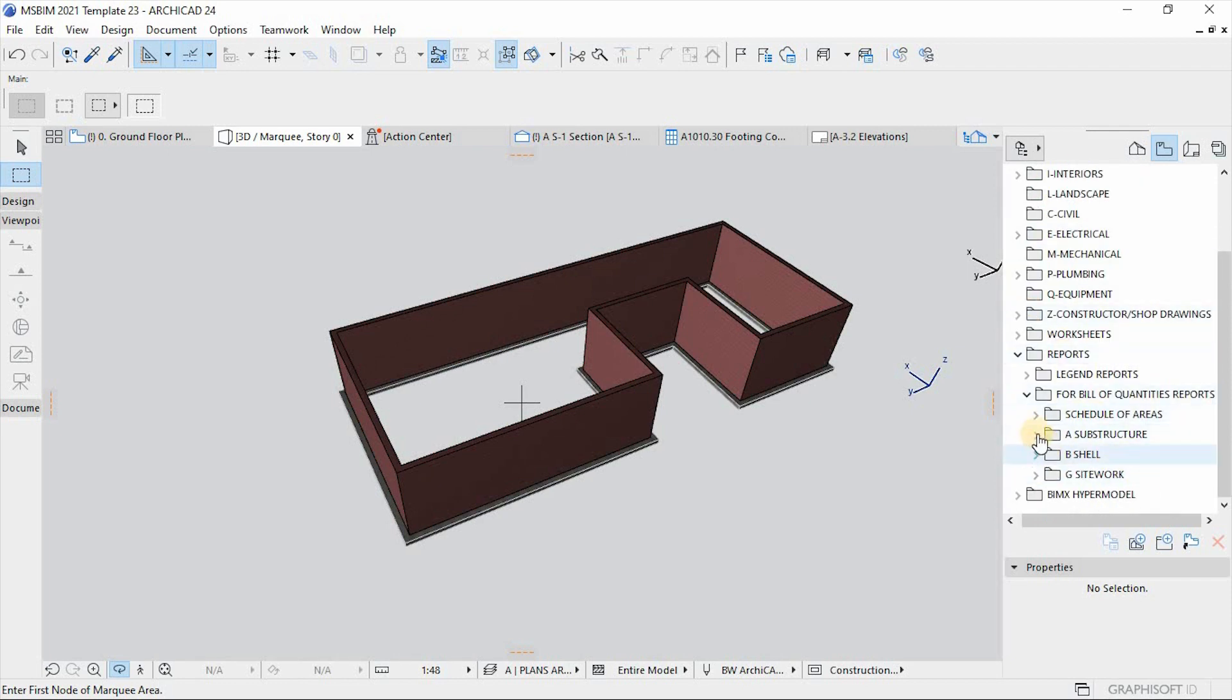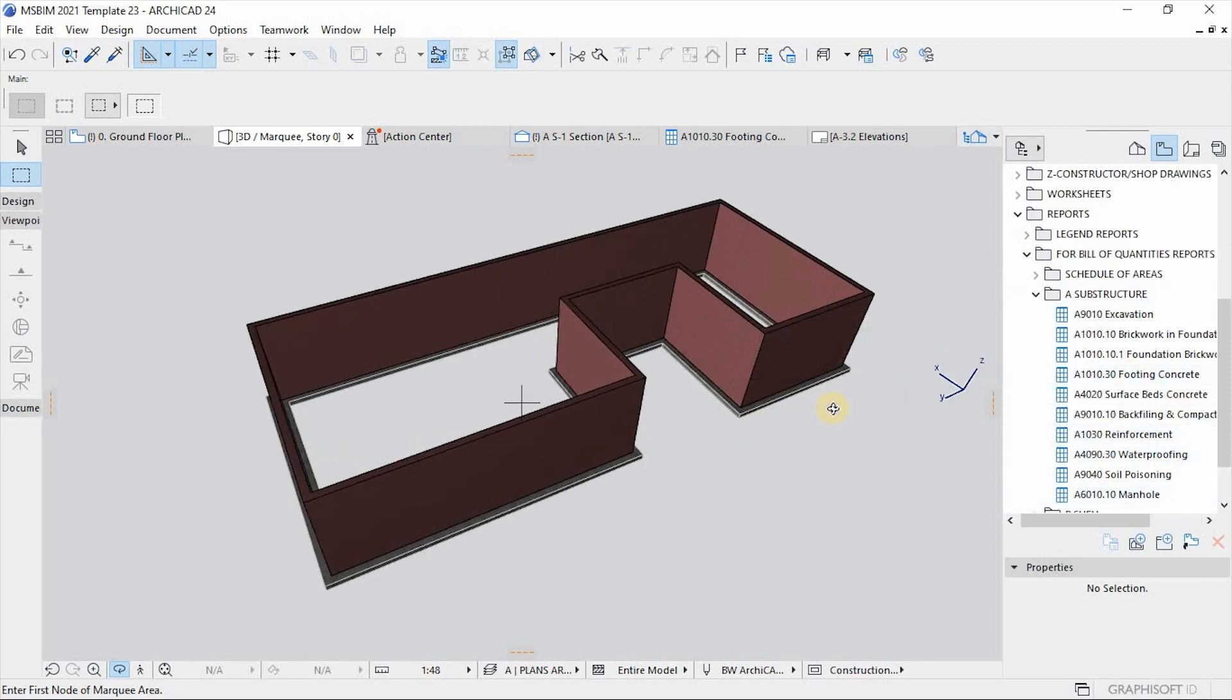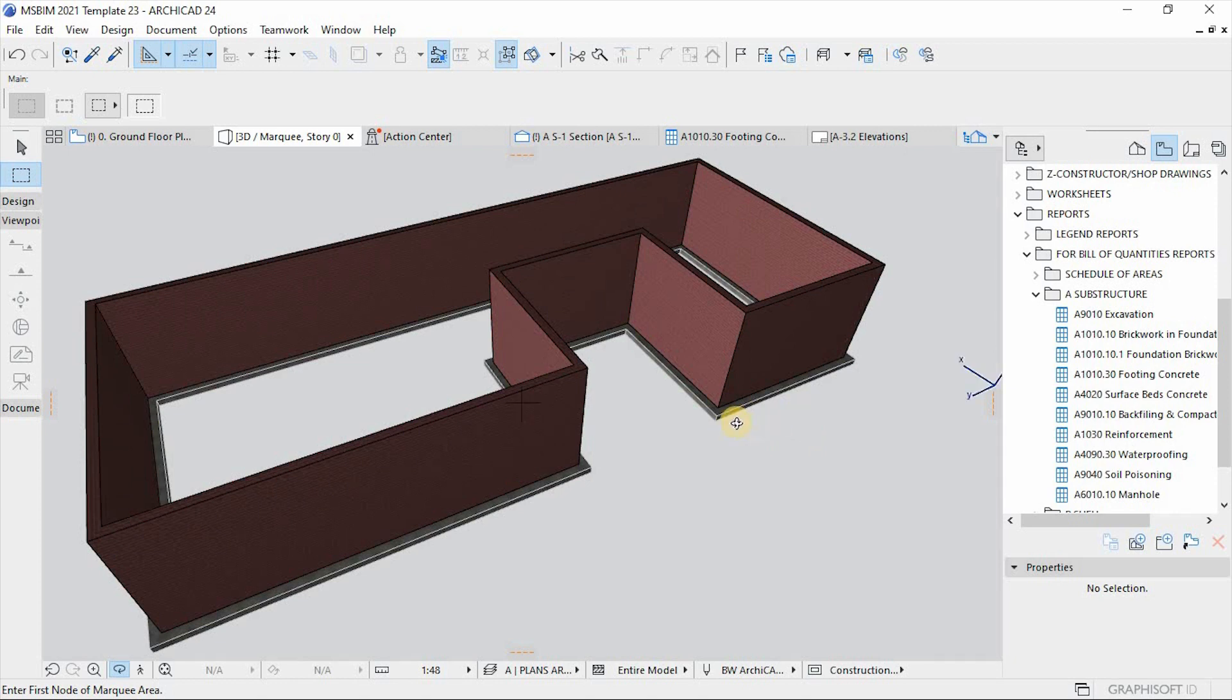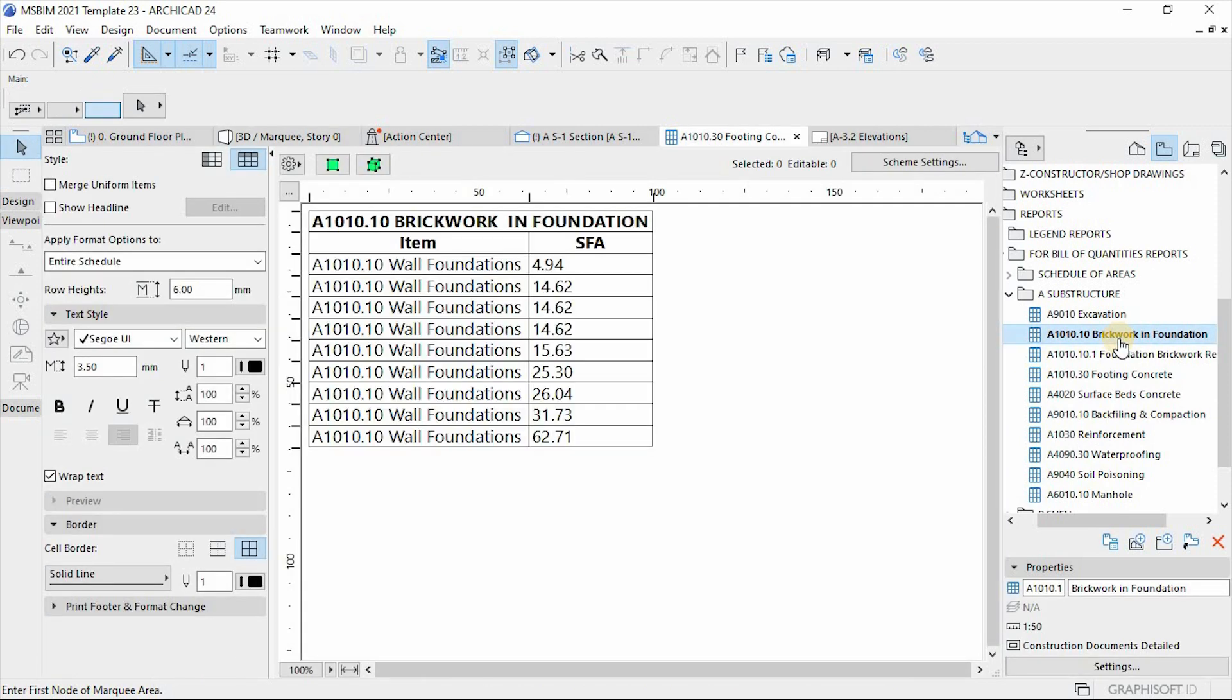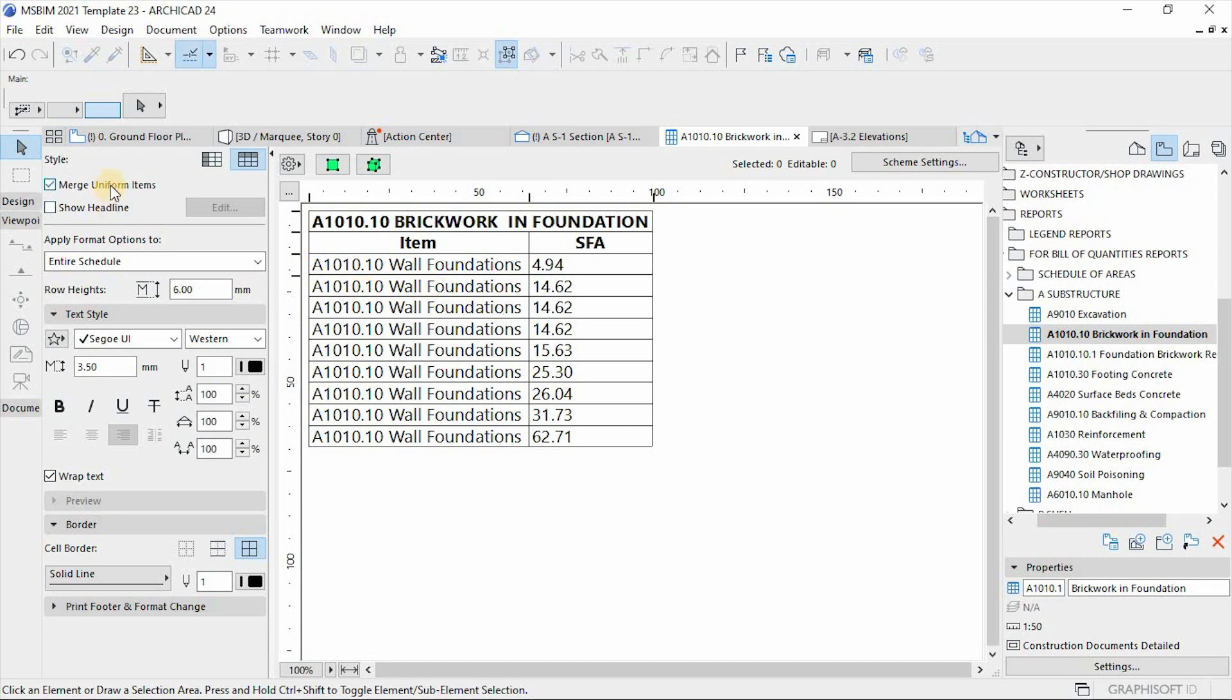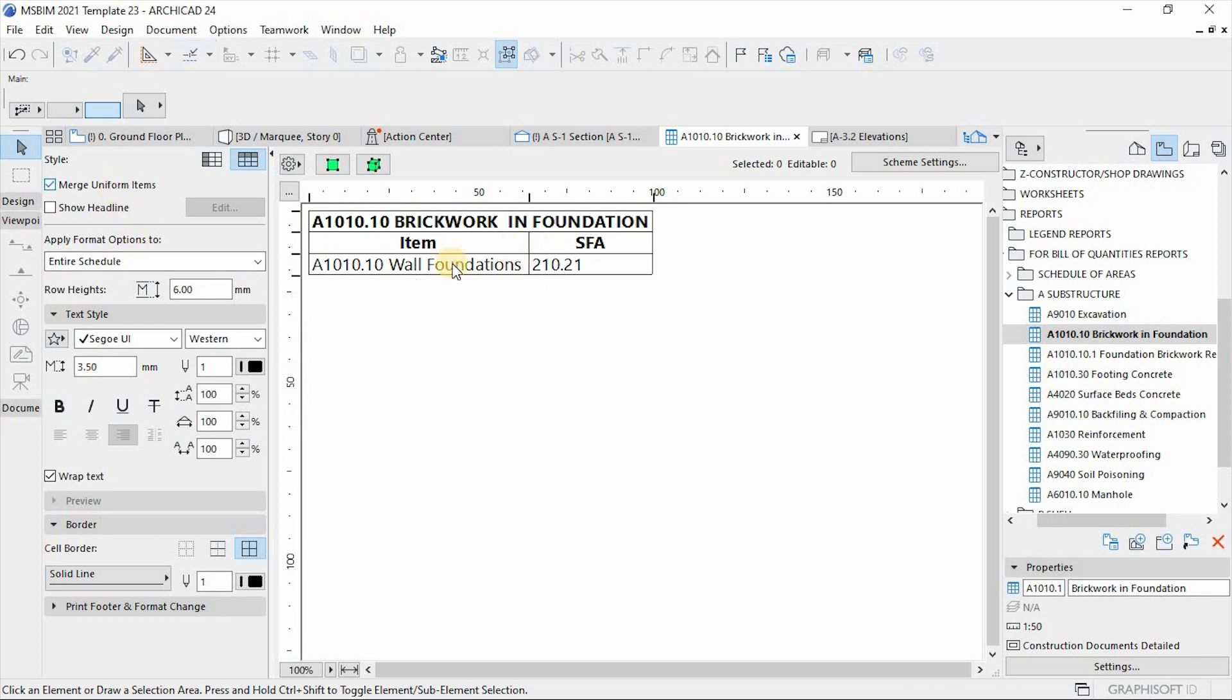So I'm gonna focus only under the substructure. We have foundation walls and then we have footing for concrete. So if you check the brickwork and foundation schedule already, there's data that is being reflected here. You can merge or unmerge. The most important thing about reporting the brickwork for costing is the surface area, the surface area that determines the pricing or the cost of the brick. So this is the data that we're going to export to the Excel template.